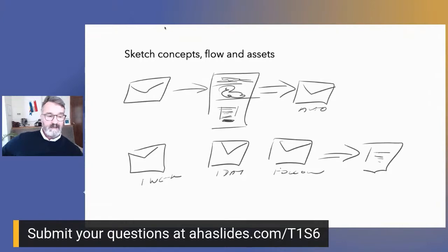Here's how I go. When I move into execution, I don't just jump in. What I do is I start with simple sketches. I sketch out the concepts. I sketch out the flow. I figure out the assets. And I'm doing this with my client in real time.